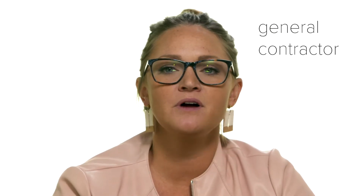The next level of service and management would be hiring a general contractor. A general contractor is going to carry that license, and he's going to source subcontractors for you. So he'll find you a licensed plumber, a licensed electrician, and he'll coordinate their schedules and manage the installation of your project. Now, the design portion is going to be left to you, as well as the products. Typically, GCs are not designers, but he is going to make sure that the work gets done, and gets done well and to code. So this is a bit more expensive than hiring a jack of all trades to do the project for you.